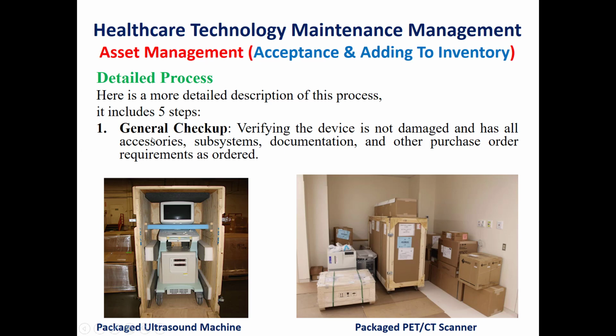The first step will be a general checkup. This general checkup will include the verification that the device is not damaged and has all the accessories and subsystems, documentation, and other purchase order requirements as ordered.